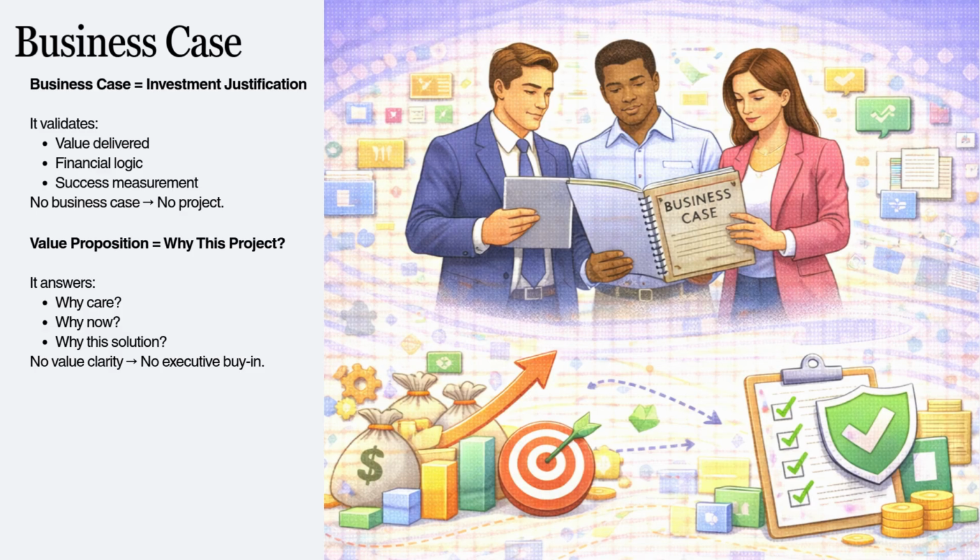A business case is not a formality, it is an investment justification document. It validates strategic alignment before operational effort begins. Executives do not fund projects, they fund outcomes. A well prepared business case answers three fundamental questions: what value will be delivered, why the investment is worth the capital outlay, and how success will be measured.